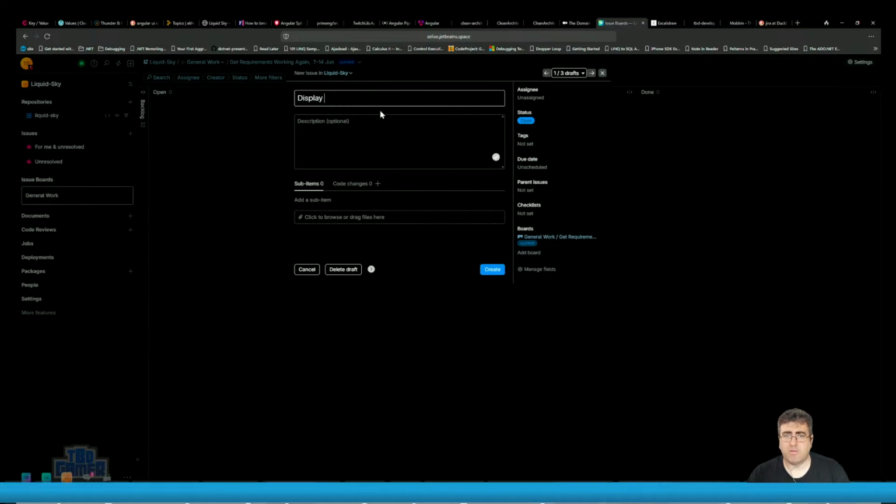And we oftentimes do get comfortable in the code enough to get a good feeling, but that's why pointing is around, right? That's why points are, and we've debated this a little bit in Discord. Points, if used effectively, are a good measure for management about, okay, I think this will take them a while, but it stops the developer from being forced to give an actual timeline. Because in some places it becomes a deadline, right? I need an hour. Oh, and then they're on you. Like, well, why haven't you got this done yet? Right?